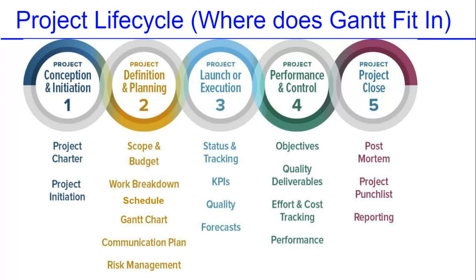So, where does the Gantt fit in? Well, if you look at this chart right here, you have your 5 phases, and you can see that the Gantt chart is under phase number 2, which is your project definition and planning. Once you have your scope and budget, your work breakdown schedule, you're ready to start that Gantt chart. And as we've discussed before, part of that work breakdown schedule and the planning you're going to be doing before you start your Gantt chart is you're going to be coming up with that timeline first and then the PERT chart.